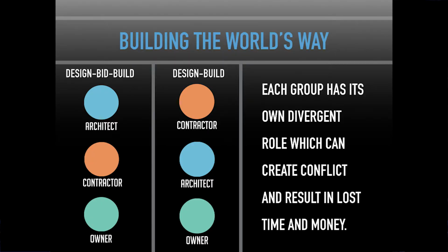Architect, contractor, one contract. Argument stops. There is no arguing. We're under one contract. We work with each other. But in a design build arrangement, know this, I as an architect do not work for you. I am not your trusted advisor. My first responsibility is health, safety, welfare. It is not to the owner and to protect him from the cost advances of a contractor. It is not. I am silent. Done. I don't enter the conversation. I back slowly out of the trailer when those discussions come up.